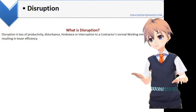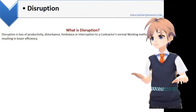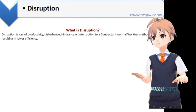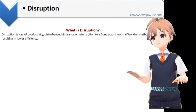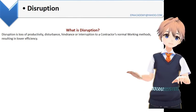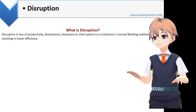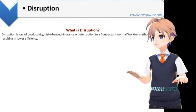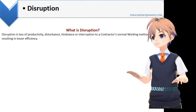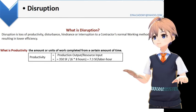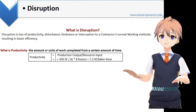What is disruption? Disruption is loss of productivity, disturbance, hindrance, or interruption to a contractor's normal working methods resulting in lower efficiency. Disrupted work is work that is carried out less efficiently than it would have been. If caused by the employer, it may give rise to a right to compensation either under the contract or as a breach of contract. What is productivity? The amount or units of work completed from a certain amount of time.